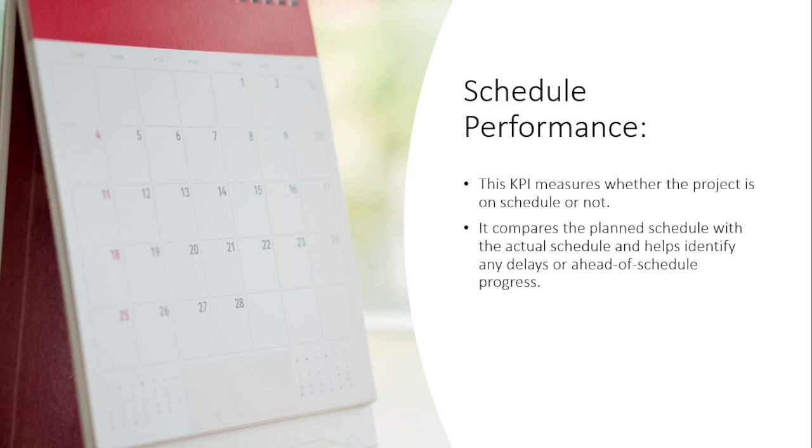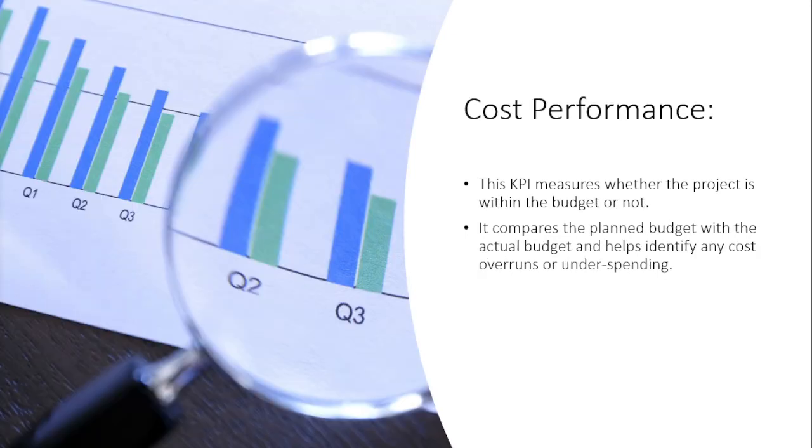It tells you how well you are performing. SPI is a measure of what did you promise, what did you get done, what was promised within the time frame, what did you actually get done, planned schedule versus actual schedule. Cost performance index. Earned value divided by actual cost. If you are able to measure this sensibly, it is not a bad one to use.